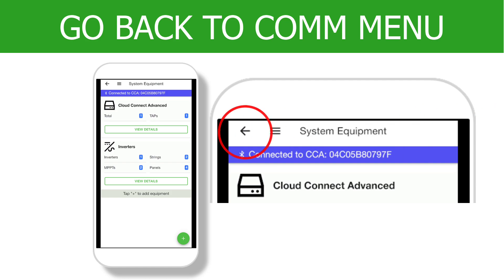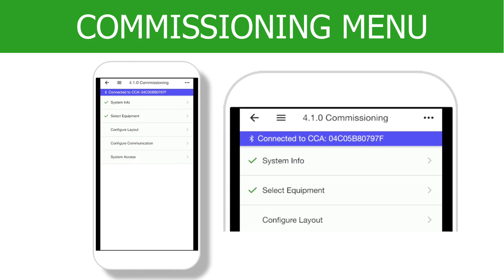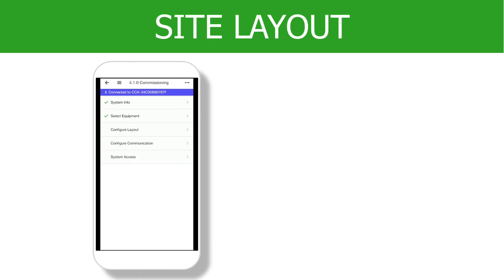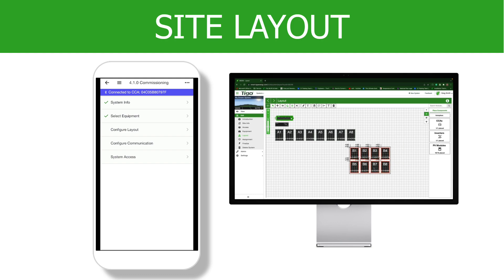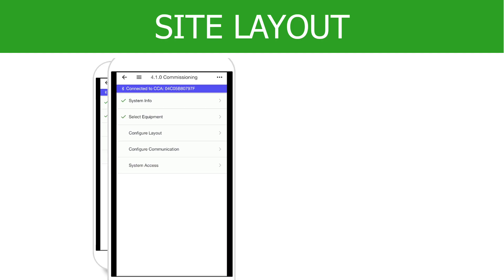Tap the back arrow at the top of the screen to go back to the commissioning menu. Notice the Select Equipment option now has a green check mark. Now it is time to configure the Site Layout. For small systems, the app can be used while on-site to complete this part of the commissioning. For larger systems, it may be more efficient to use the EI Portal Site Layout tool covered in a previous lesson.